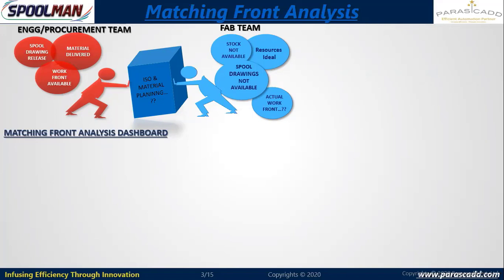That is, the vendor has delivered the material, and I will be receiving it in 2 weeks' time. But before that, based on the material that has been dispatched and is in transit, I can perform analysis and inform my contractor well in advance that in the next two weeks I'm going to get this much material, based on which I can fabricate, say, 500 spools. So keep your 3 gangs ready for this particular area. This level of planning can take place.